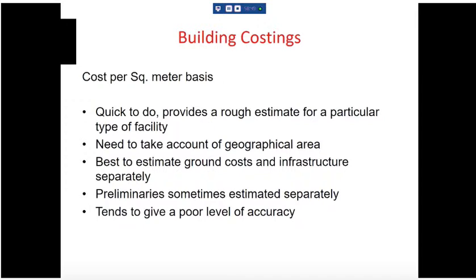And we got planning permission for it, but because it was a tricky boathouse on a tricky site with nowhere for the contractor to put their setup, it was going to cost a load of money to build loads of scaffolding and put their site setup and everything above it. Plus they'd have to have deliveries at really weird times of the day. Plus there are all sorts of issues to do with not contaminating the river.